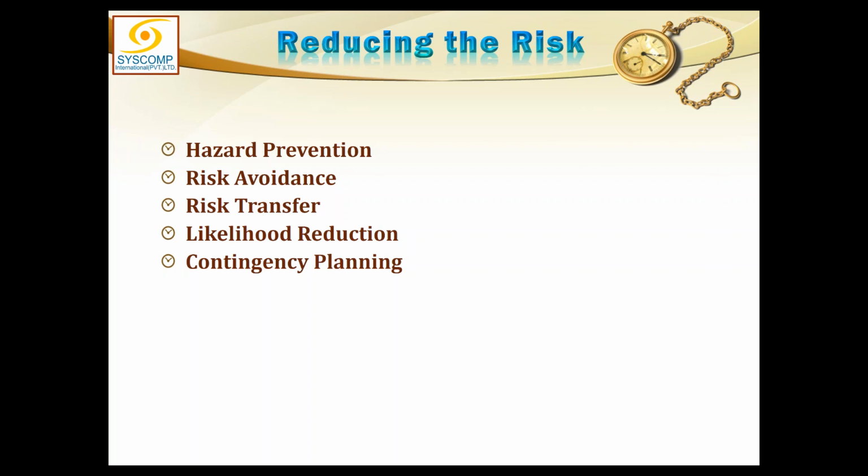Okay, let us say that we did not decrease the probability, we could not do that, and we removed all the expensive items. Now the worth of the items in the room is only 1 lakh rupees, but the probability is the same, 10%. Again 10,000.